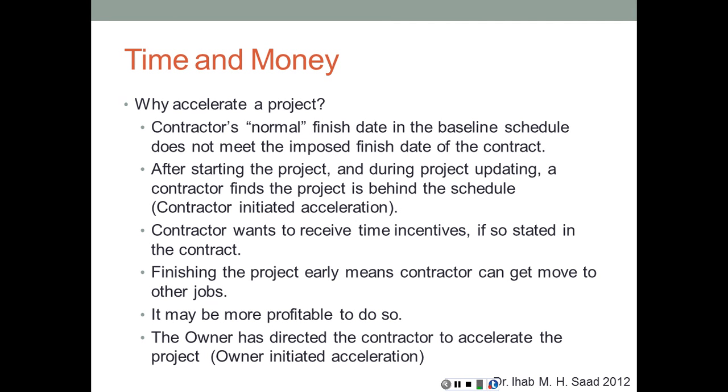If he does not meet that date, then they will have to accelerate. After starting the project and during project updating, the contractor finds that the project is behind schedule. Again, in order to avoid paying liquidated damages, they will have to accelerate. Or if the contractor wants to receive time incentives, if so stated in the contract.